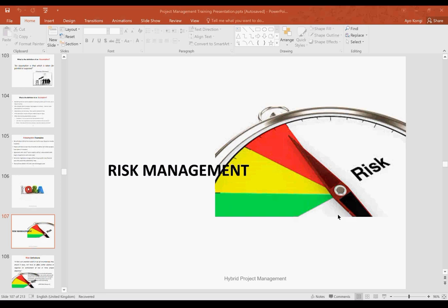Then you have your project brief that is saying your go, no go decision. You get the green flag from the sponsor that says yes, you can go ahead. The moment you can go ahead, you now start developing your risk register. You want to start developing your issue register. You want to develop your RAID log from this stage, because some risks will start coming up and you need to start documenting them.